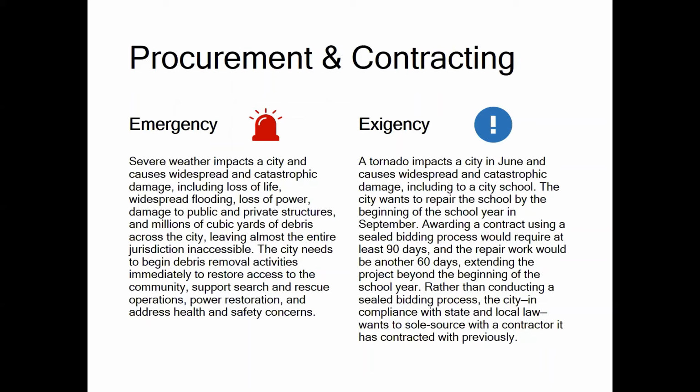Exigency is defined as the existence of a need to avoid, prevent, or alleviate serious harm or injury, financial or otherwise, to the applicant. Emergency is defined as the existence of a threat to life, public health, or safety, or improved property, requiring immediate action to alleviate that threat. So what might these look like? Let's look at these two scenarios.